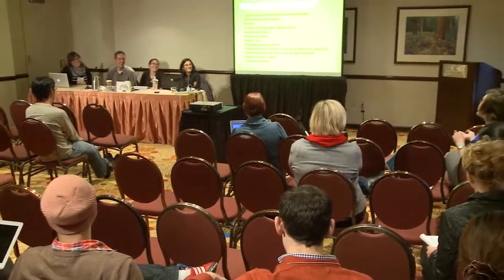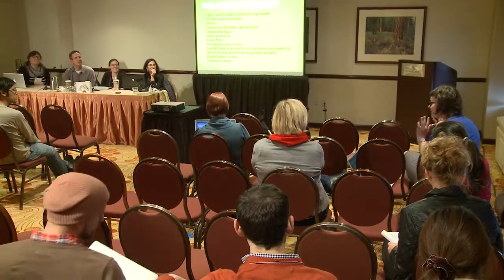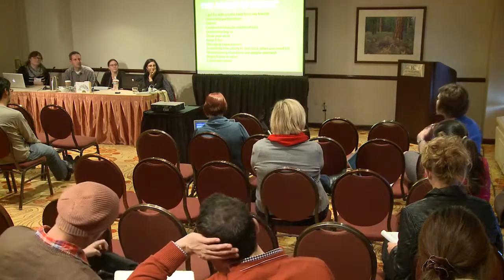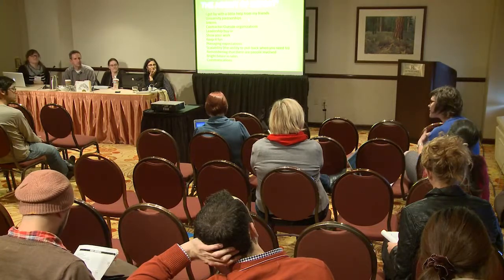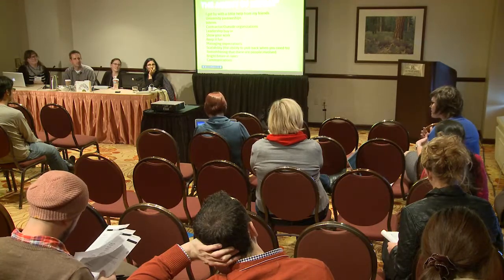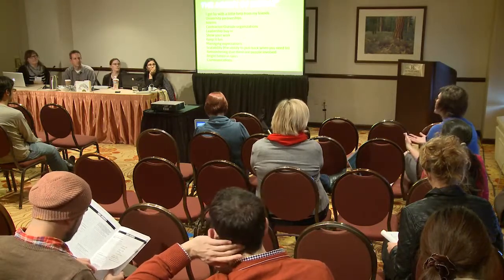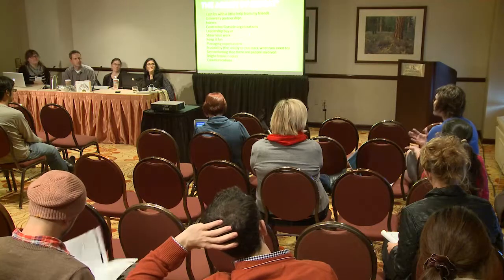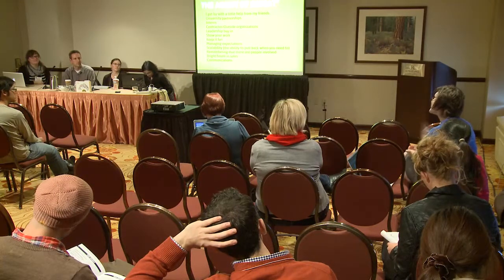Sorry, go ahead. Well, I love what you were saying about translating, because it is true, different kinds of libraries, we don't talk to each other very well. But as somebody who gets super excited about metadata and controlled vocabularies and authority control, when you're trying to get other people passionate about a project you're working on, and you drop 27 acronyms in one paragraph, it is really hard to communicate. One thing I've learned that's been really successful in managing a lot of the digital projects we do is that if I sit down with our grant writer or a friend in development, and do the staff education it takes to get that person to understand what I'm doing so that they could sell my project to a donor, then she can say it back to me.